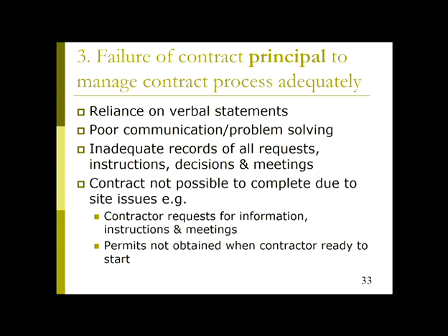Another aspect of that, and some of you will be applying for permits to do work, is that permits take time to get. You can't just sort of rock up to council and say, I want a permit to do something and get it the same day. If you don't start that process in time, it may be that when the job gets to that point where the permit is needed to continue, it may have to stop and wait for the permit. And so both of these sorts of delay or hold up need to be avoided as much as possible.